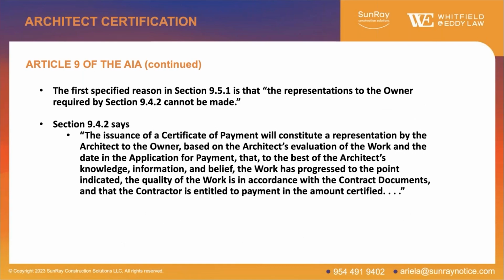And the first reason that the architect can use to withhold certification is if representations to the owner required by section 9.4.2 cannot be made. Now, what does that provision say? Well, here on the slide, it says that based on the architect's evaluation of the work and the pay app, the work has progressed to the point indicated. So again, is the work progressing timely?